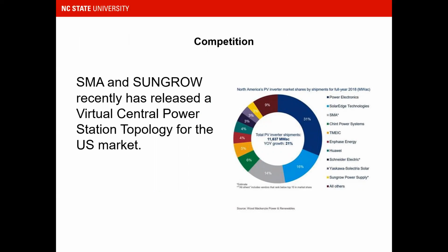However, the solution that they are proposing is developed in Europe, and the other one is developed in China. So they have to bring all the equipment here to the US, and it has to be UL certified. What we are trying to achieve is to install everything in the US and use UL components, so we don't need external certification. So we are reducing the risk and also the time and price.